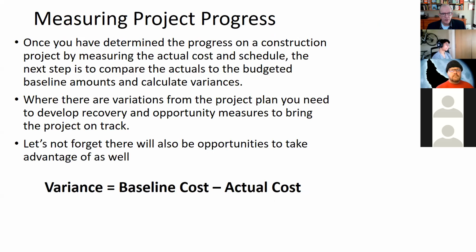So at the end of the day, though, what if we're looking at trying to make cost savings as opposed to just the progress payments, which is a big deal. The progress payments are a big deal. Every contractor wants to try to get paid for the work they're doing as they're doing it as much as possible. You're already in a hole because of holdback amounts due to lien legislation. It's a tough go from a liquidity point of view.